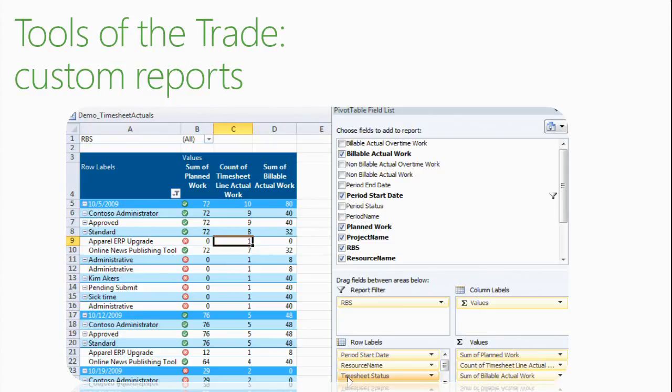I've also seen a customer, I didn't put an example there, with one column per week for each of the resources, showing with a graphical indicator the status of the timesheet or the task update. It's green, it was reported, approved, and so on. If it's not, it's red, or if it's in process, it's yellow. So by week, and for many weeks, in one snapshot, you can see everything that's going on in your system with that type of thing. It's all based on queries and formatted reports, basically, using Excel.